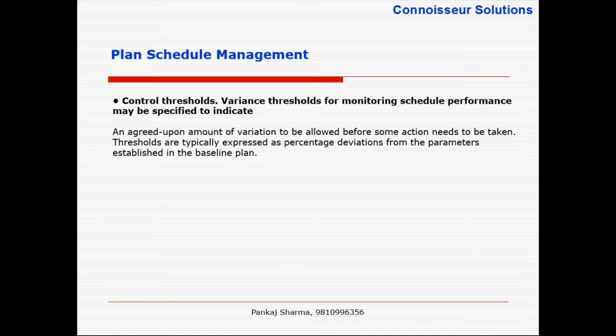on the schedule target. However, if you forecast things might go beyond that, you don't have any right to take a decision. You should escalate it to the next level. But as long as you are predicting some variation might happen in the schedule, but within the tolerance level, you can take a decision on your own. Does it make sense or not? Okay. Yes.